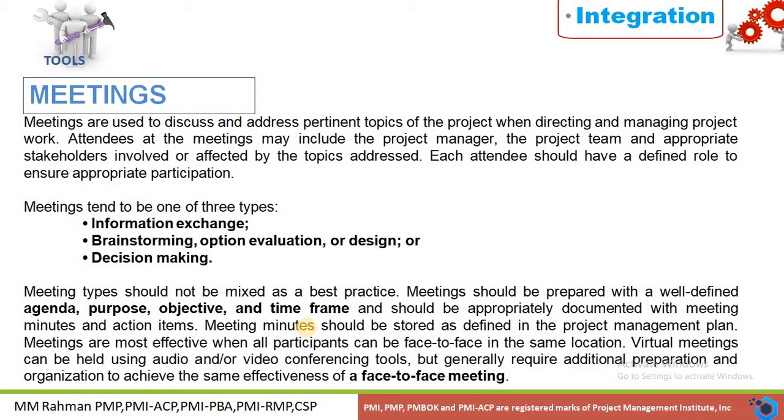Meetings tend to be of three types: information exchange, brainstorming and option evaluation and design, then decision making. Meeting types should not be mixed, as a best practice. Meetings should be prepared with a well-defined agenda, purpose, objectives and time frame, and should be appropriately documented as meeting minutes and action items.